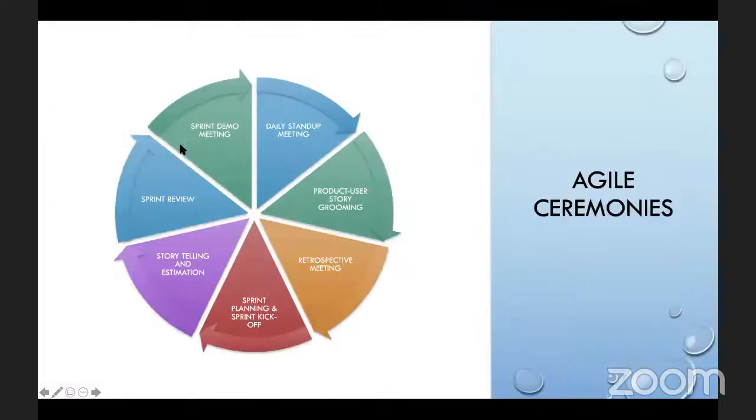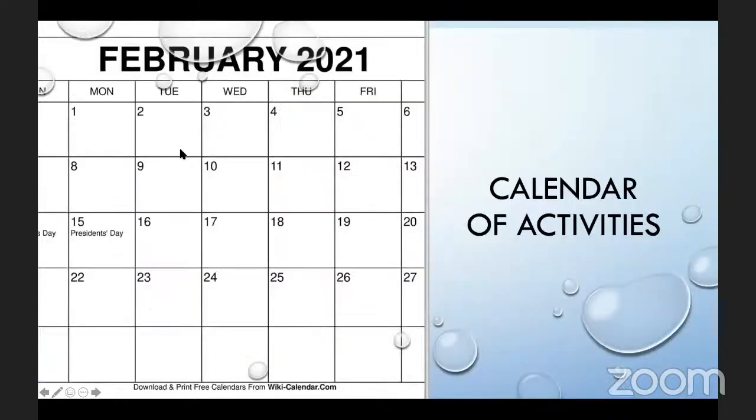And then for the storytelling estimation meeting, usually you talk about the stories that you've written. Whilst you're writing stories, you're going to be bringing the stories up for estimation. So storytelling is just narrating, telling them the story. For example, the story you have written for the donate feature: as a user, I want to be able to do this. You're narrating, telling them what the story is about, right? After that, they will respond, and they will estimate the story.